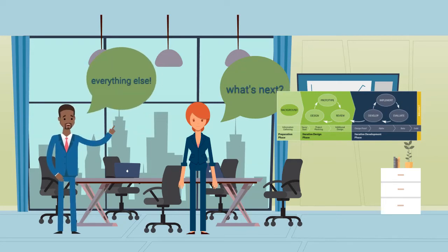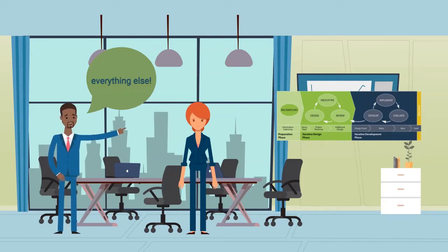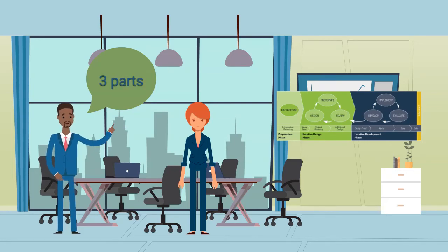Pretty much everything else we need to do. In small projects, after the Savvy Start, all of the stages of design and development run simultaneously. This makes it easy to spot a problem in one phase, repair it, and correct any related factors. Unlike ADDIE, it's not a top-down system, and because everything is collaborative, each team and process feeds off the other. Even with bigger projects, SAM has just 3 parts: preparation and the Savvy Start, iterative design, and iterative development.